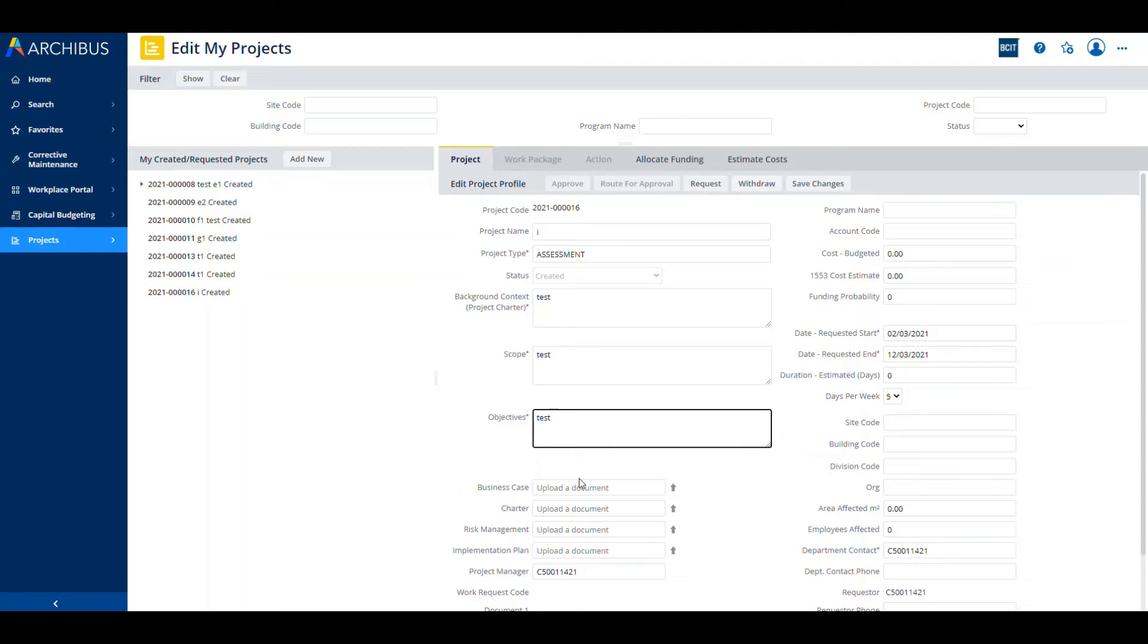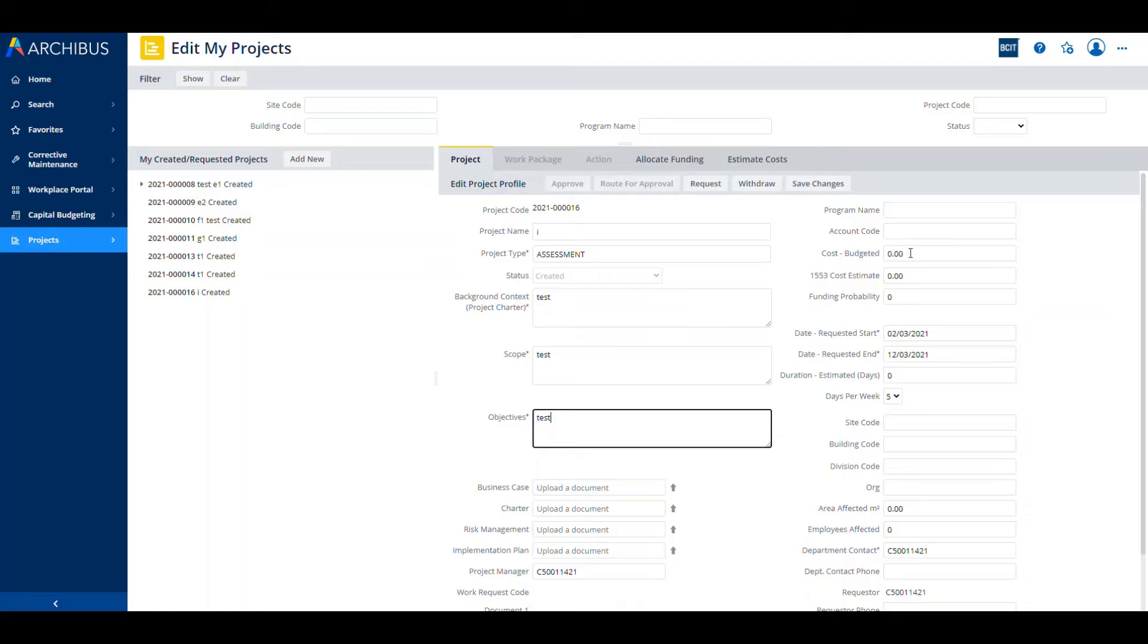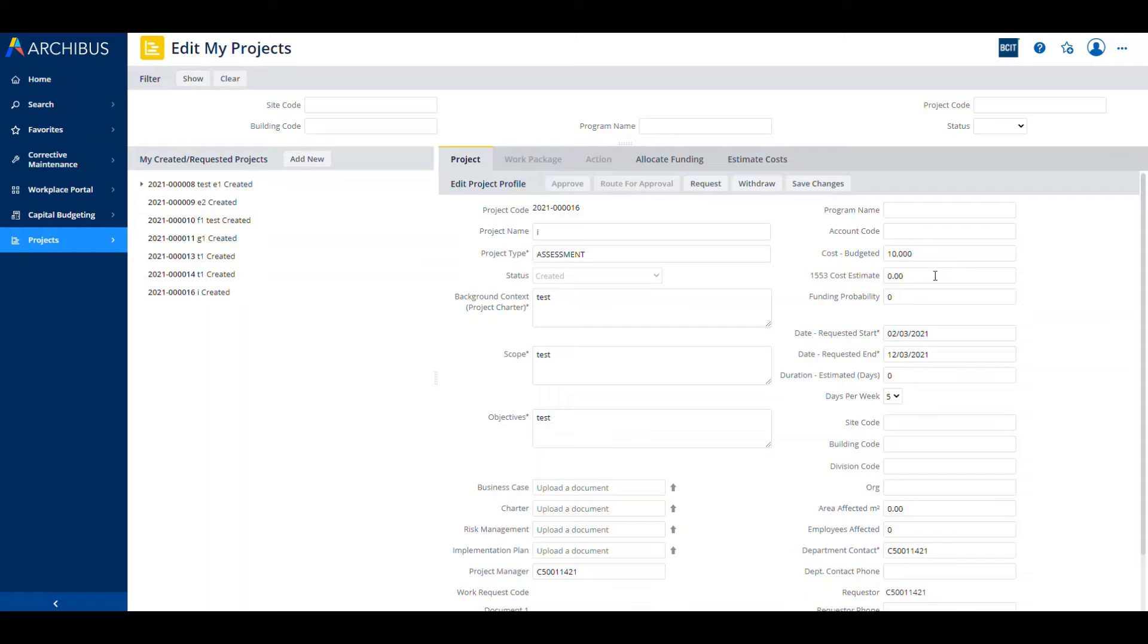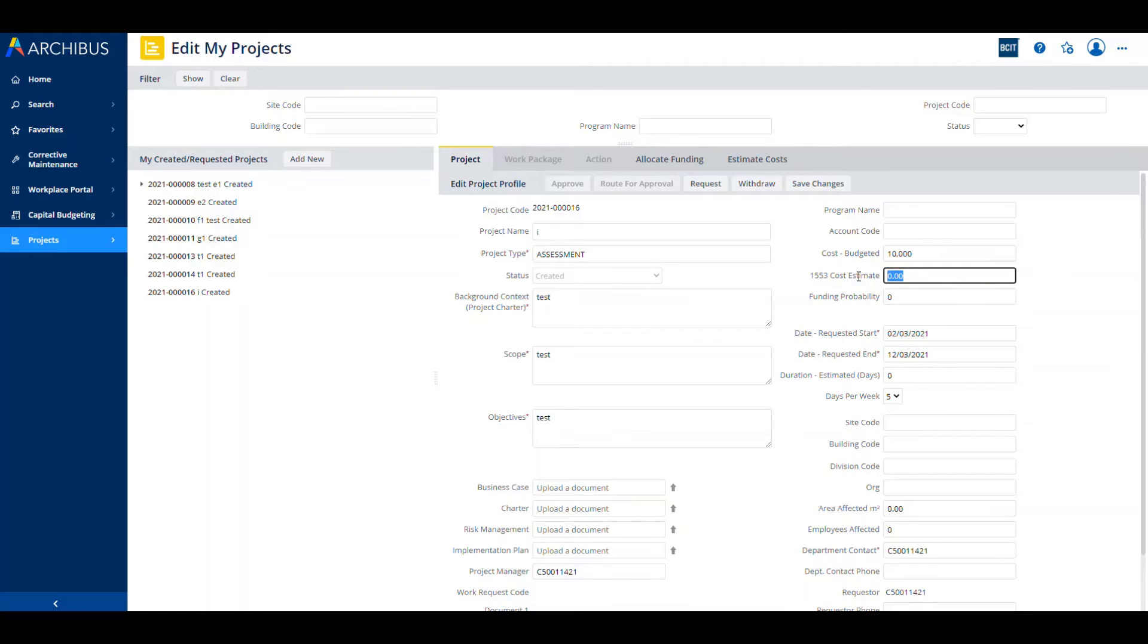Next up, let's talk about the cost and the cost estimate and the difference between the two. Cost budgeted is a number that will typically be provided by Ian or Joe. It is an order of magnitude number, a high-level estimate of what the budgeted cost is going to be. We're going to put that in as $10,000. The 1553 cost estimate, all PMs will be familiar with that, is the ability to put the number in that you've got from your script spreadsheet from the 1553. We're going to put that in a little bit less. Ian and Joe budgeted $10,000 for it. We're going to call it $9,000 for our purposes.